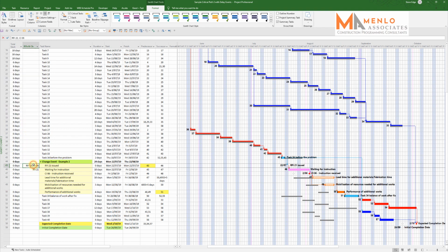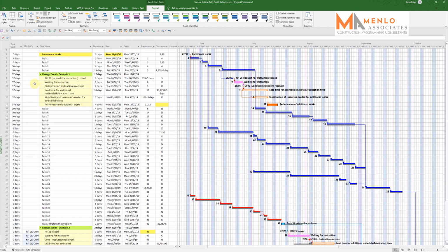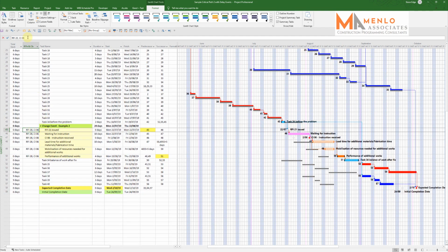So it allows me, at the end of the month, when we're doing reports for project control group meetings and reporting on progress, to show very, very quickly outstanding RFIs that are still waiting on an answer, and we can prompt the client to get his act together and give us an answer. And you'll notice in there I put the wrong RFI number against the other one. So I'll scroll that down, and this is in fact RFI 21, not RFI 20.